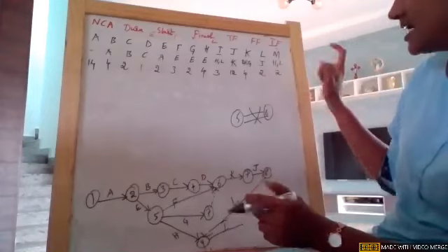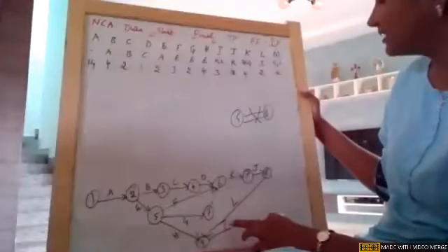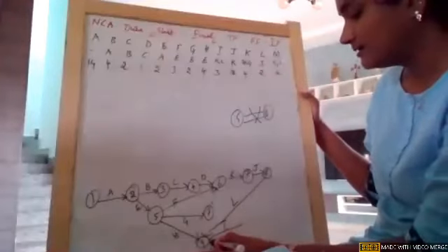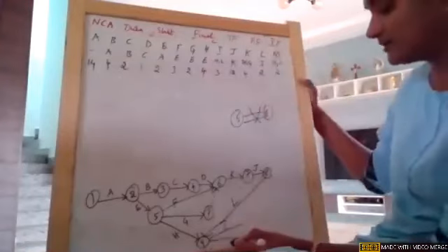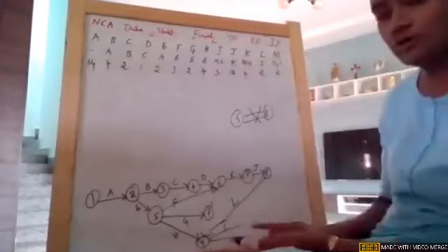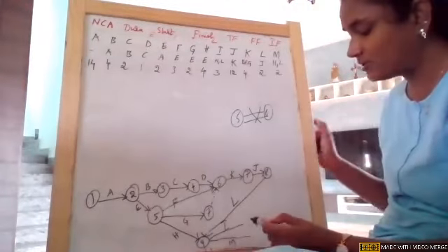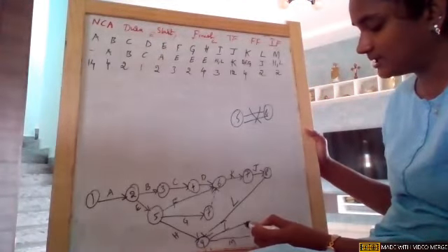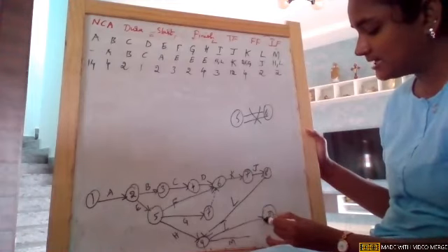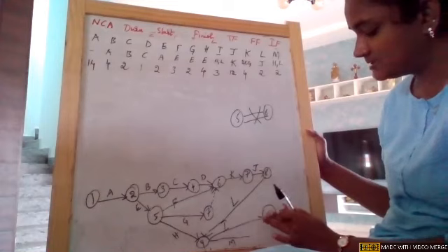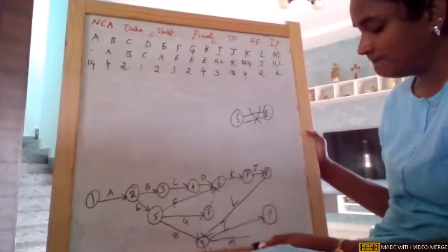J is giving, H and L together are giving rise to M. Here also, H and L are giving rise to I, and H and L are also giving rise to M. Again, I told you we can't leave them open, girls. We need to conclude them with a node. So I'll again insert a dummy. They are again parallel activities. So my dummy will be this one.